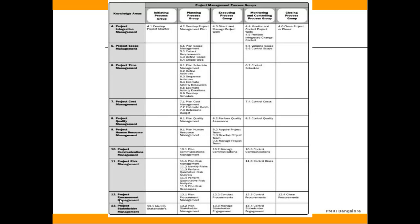To understand this better, here we have on the vertical axis the 10 knowledge areas, and on the horizontal axis the 5 process groups of Initiation, Planning, Execution, Monitoring and Controlling, and Closing. If you look at the process Develop Project Charter, it is linked to the Initiation Process Group and to the Project Integration Management Knowledge Area. Likewise, Identify Stakeholders is part of the Initiation Process Group and is linked to the Project Stakeholder Management Knowledge Area. So every one of the 47 processes is linked to one Knowledge Area and one Process Group.